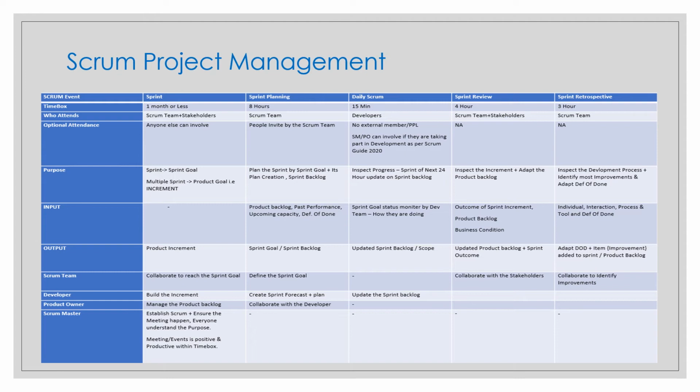Nevertheless, only the product owner has the authority to cancel the sprint. They may be advised by the stakeholders, the development team and the Scrum master, but only the product owner can take the decision. If the sprint is cancelled, the completed product backlog items will be reviewed, and incomplete backlog items will be re-estimated and put back into the product backlog.